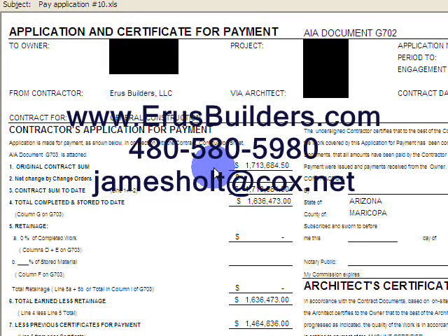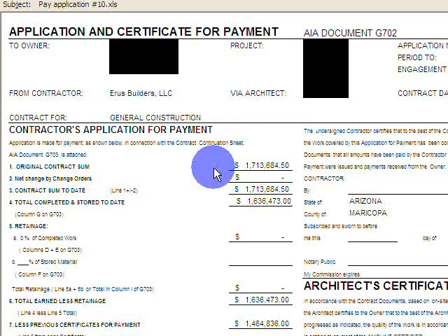We're going to cover in this video construction pay applications and construction invoices, specifically from builder to owner. So I'm going to go over this pay application in a minute, but there's a couple things I want to talk about first. Most importantly, you want to make sure that the pay application or the invoice process is agreed up front in your construction contract.